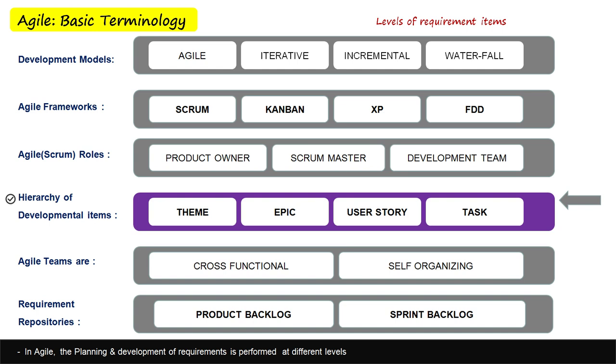Each epic possesses a certain set of features of a product or application. These are high-level requirements at the product or project level. Epics are further broken down into multiple user stories. An epic is basically a group of interrelated or functionally bound user stories. Each of these user stories serves certain functionality, keeping the end user in reference.